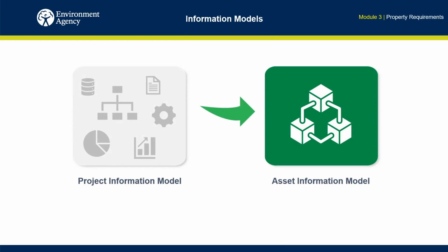Project information models developed during project delivery require information to be consistent and in a format that allows it to be transferred into our asset information model. The transfer of information between these information models is via GeoCobi datasheets at project gateways. GeoCobi datasheets are an efficient way of transferring large sources of information into the asset information model and ensuring it is delivered in a standard format.